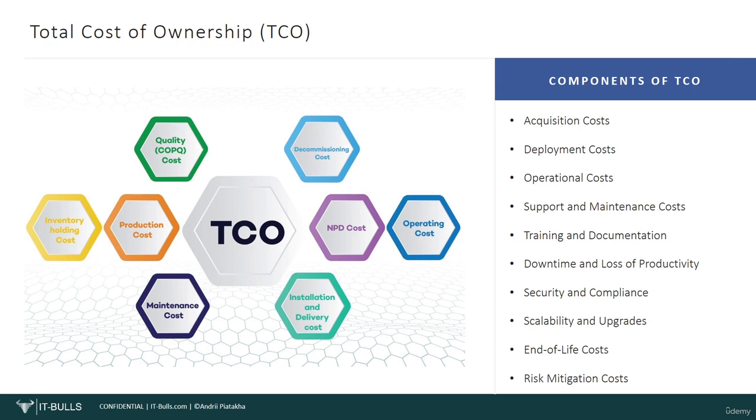A simple example from real life. Hosting a service in-house inside your organization will cost you more at the beginning because you need to buy an expensive server, but will cost you significantly less even with support in the long run, in case we compare these costs with potential costs that you pay for a cloud. Of course, cloud provides a lot of other advantages, but lower operational costs from the start with a cloud solution will become significantly bigger in the long run if we compare with an in-house server.